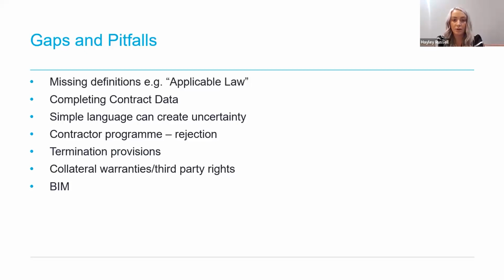However, NEC4 still does not cover what happens if the programme is rejected. Often then, there can be an impasse where the programme is rejected by the project manager. A contract amendment, in our opinion, would be desirable here to provide more certainty for parties.